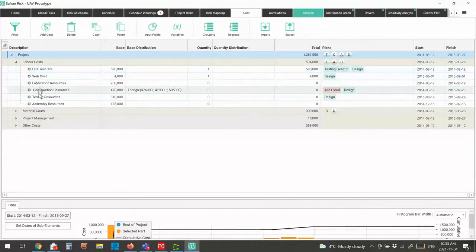I can put my line items in here. I can have a base cost. I can have an uncertainty on that base cost. I can define quantities and total cost for these. So if I don't want to just put a number in here, I can actually build it up by saying, okay, this is going to be, say, 2,500 weld inches at so many dollars per weld inch. And I can build it up that way, and then I can build uncertainty on the elements that build up that particular line item.